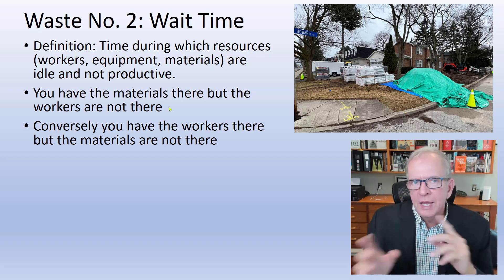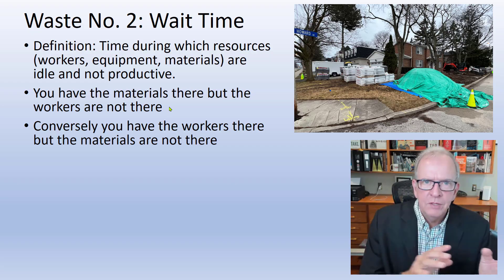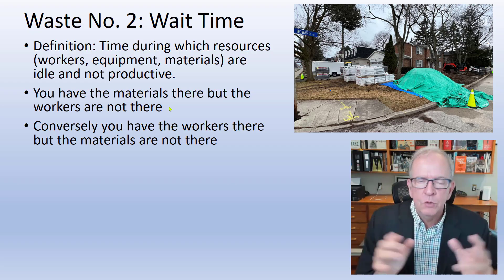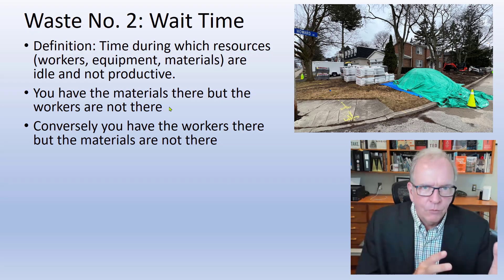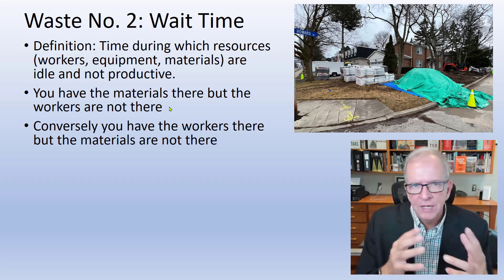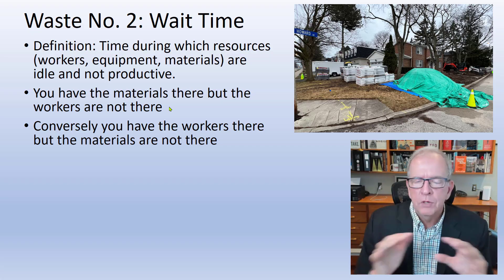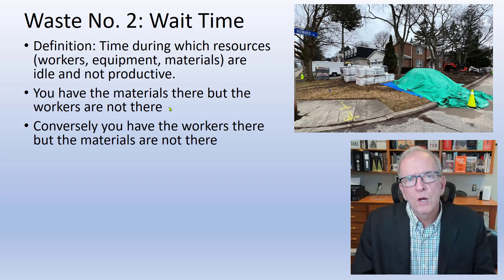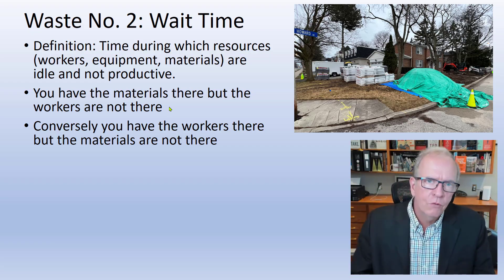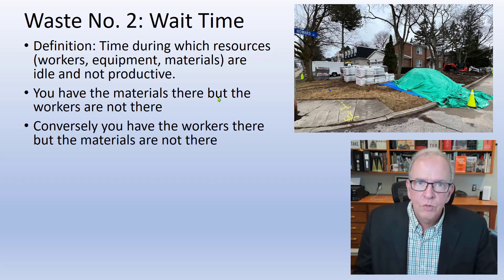The problem with trying to get everybody to work faster is that some trades will work way faster than others, creating bottlenecks or work being done ahead of when it should be, leading to a lot of rework. Those are other areas of waste that become integrated with this one. The eight areas of waste are not mutually exclusive — they crisscross each other; one causes another and so on.